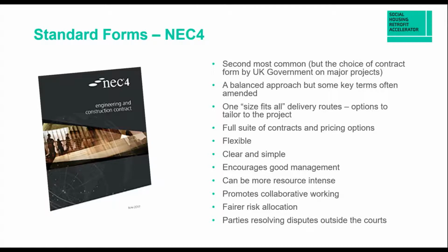NEC does promote more collaborative working. As I said before, collaboration is a real cornerstone of NEC as opposed to JCT. Generally speaking, it does have a fairer risk allocation, although subject to those few tweaks that we referenced earlier. And it encourages parties to resolve disputes outside court. So it has a tiered dispute resolution mechanism that begins with senior party negotiations, or other steps in place prior to getting to that ultimate form of tribunal, which can be the courts or arbitration.